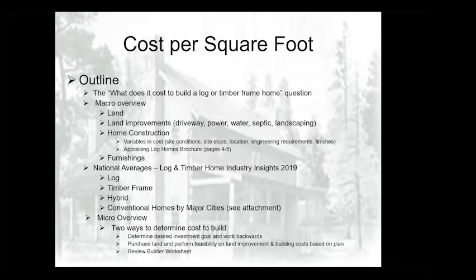We've had clients that have done very good quality finishes, but not super high end, and have been able to value engineer with things like shingle roofs and just a nice pre-finished 3-inch oak flooring, or some middle of the road cabinetry and countertop, versus somebody doing super high-end finishes and fixtures and the stone-coated metal shakes on the roof and all these other things that tend to drive that cost per square foot. And that's, in essence, the reason it's so hard to answer this question specifically.